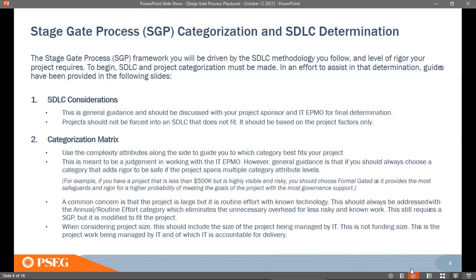Again, you have to give justification for any task that you don't want to do. It is not free, like out of 10 things, I don't want to do 10 or I don't want to do 8. No. When you pass the gate, at the gate, you have to explain why. Why do you think you don't need these 8?